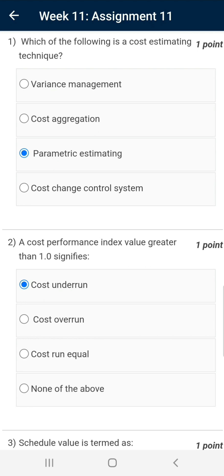Question number one: which of the following is a cost estimating technique? The correct answer is parametric estimating. Cost variance management and cost change control system are part of cost control, while cost aggregation is part of cost budgeting. Parametric estimating refers to establishing a statistical relationship with historical data. For example, if someone has to print 10 pages and the cost is 10 rupees, then the cost of 1000 pages can easily be established by extrapolating the historical data.